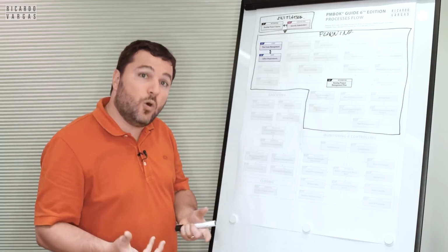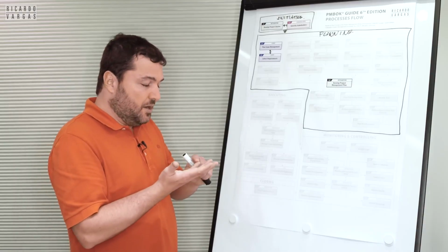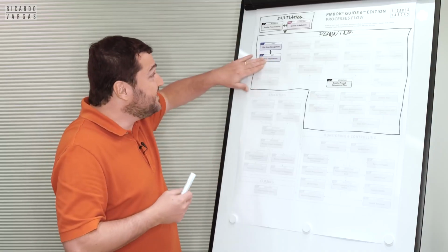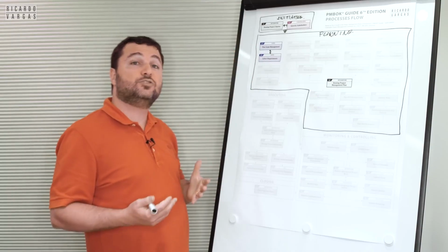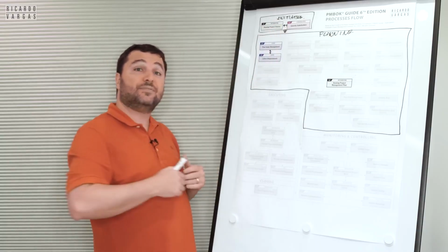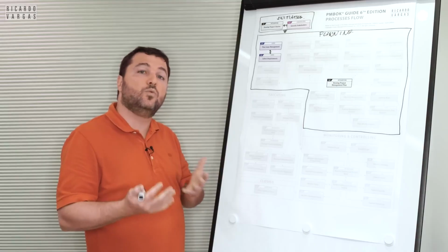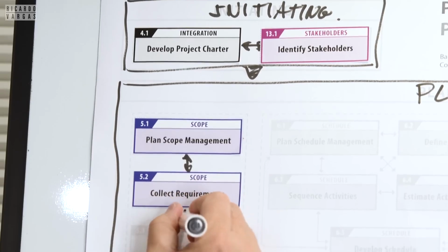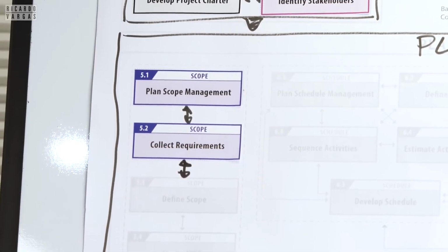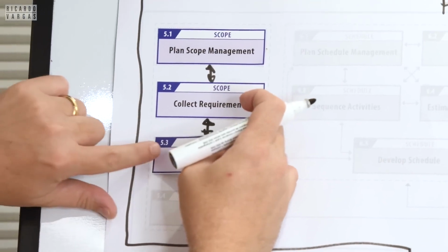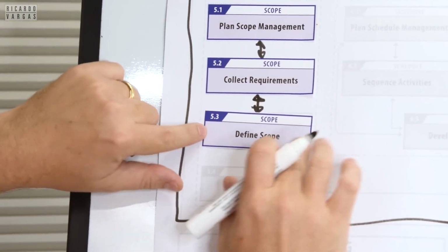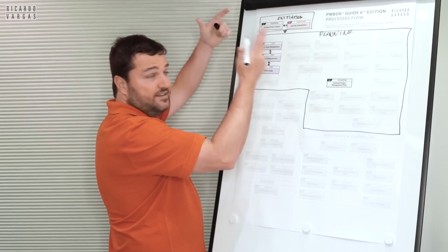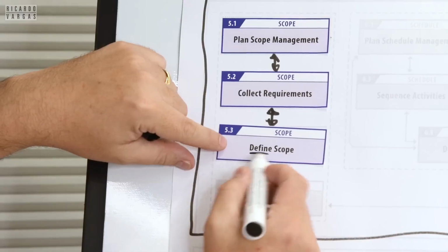And then you have the scope and the requirements of activities. Buy the engine, install the engine, test the engine. So this is where you collect, and most of the time you collect these requirements by talking to some of the stakeholders and trying to understand how you will build the way between where you are and where you want to be. After collecting these requirements, you must shape the scope of your project. Basically, you need to combine these requirements, functional, technical, and activities and parts of the work, and you define the scope.